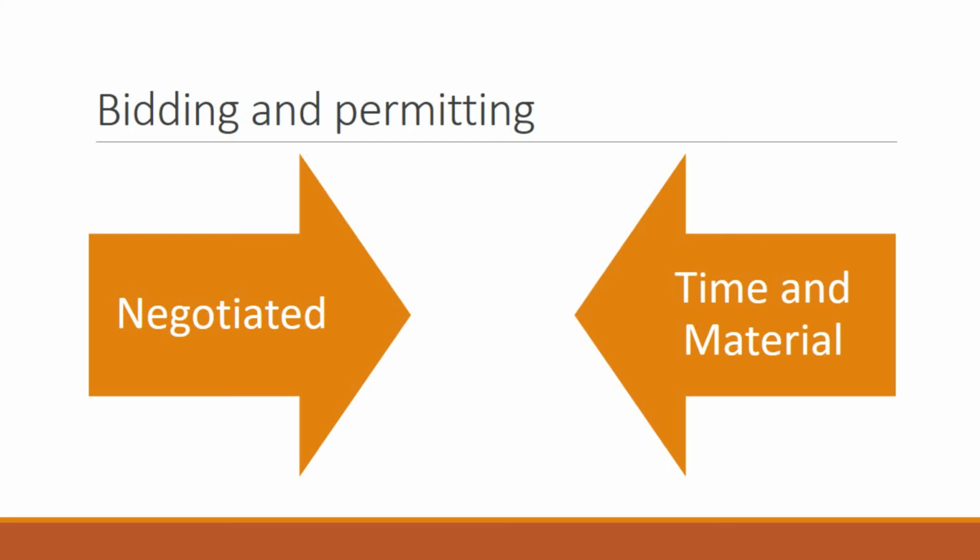Include in the initial bid guaranteed escalation rates tied to an economic indicator such as the consumer price index, etc., when you know a vendor will become proprietary after the first install, to prevent being taken advantage of later. Additionally, request price book discounts, etc., and demand that the vendor submit 3 subcontractor or supplier bids for future work as a point of an open book policy.